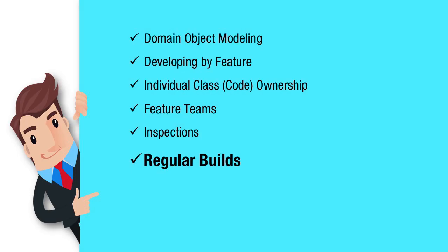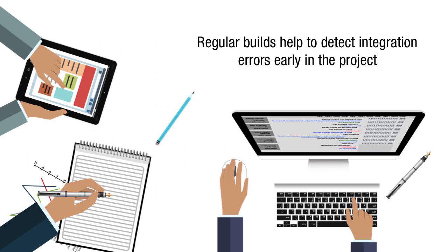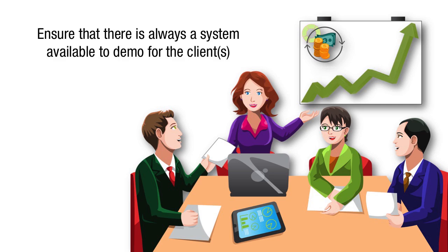Regular builds. Builds of the complete system are done at regular intervals. Regular builds help to detect integration errors early in the project and ensure that there is always a system available to demonstrate for the client.